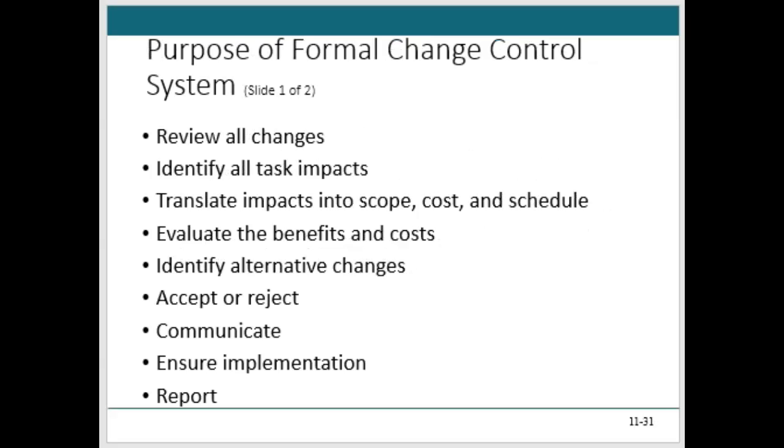Now, we do want a formal change process, which is an excellent way to go. It will help control scope creep, a formal change process where we document everything. We make sure the experts are part of the change process, that they've signed off on it, that maybe we did a peer review before the change was presented, that we tested the change before it went to the board in various environments, right?